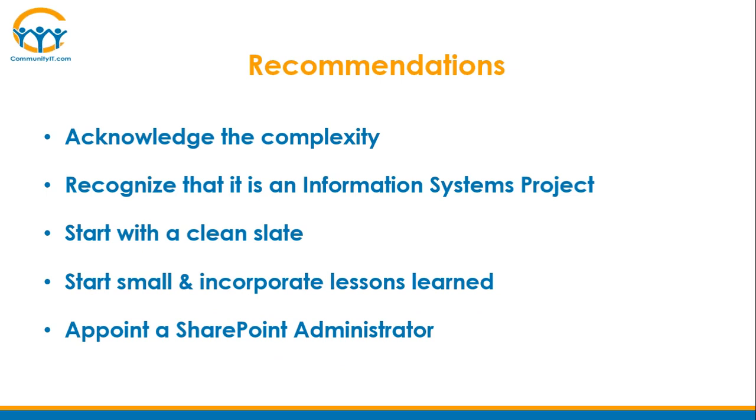While it is just technology and it's easy to set up, and if you're an IT person, turning it on and making it available to your users is an easy thing to do, the focus here is really on effective use and adoption of the system. So this goes back to the 80-20 rule. It is only 20% technology and setting up the architecture, but you're going to have 80% of your time focused on end user training and developing requirements, and having that dialogue to show people how it's better, why it's better, and identifying those opportunities.